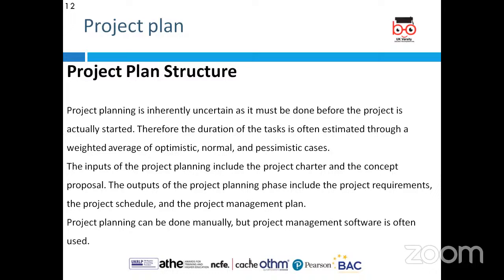Then when it comes to project plan structure, project planning is inherently uncertain, as it must be done before the project is actually started. Therefore, what happens is that the tasks will often be estimated through the weighted average of optimistic estimates.